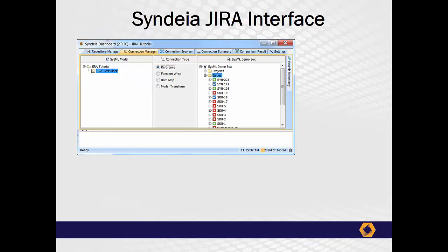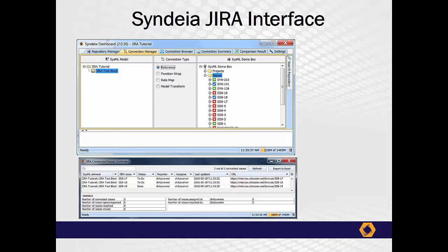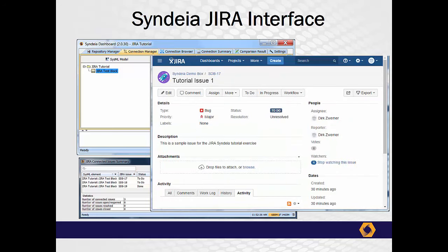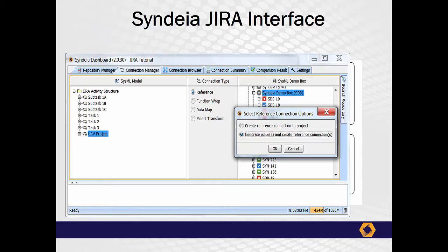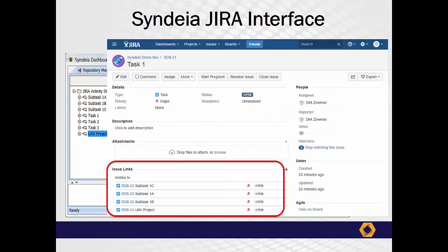Cyndia's third new interface may be the biggest leap — from systems engineering to project management. Jira is an online issue tracking system. From any element in a SysML model, we can access its Jira issue or issues, checking status, personnel assigned, or scheduled completion date. In one step, a work breakdown structure in SysML can generate a corresponding issue structure in Jira, keeping project management data at the system engineer's fingertips.